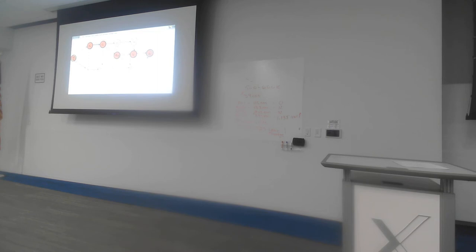There is no other way that I can get from the start node, follow through a path, and get to the end node. I've recorded all of the different paths, and I've added up all of the different durations of each of the different activities on each of those paths to get the actual normal durations of all those paths. So we can see here why the critical path, again, is the critical path. It's the path that takes the longest amount of time.